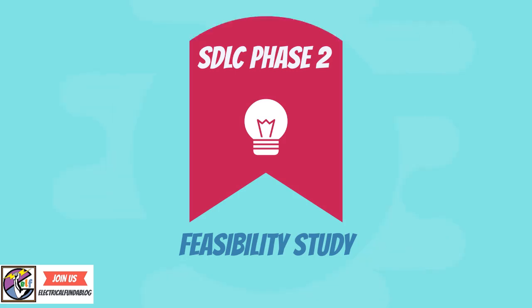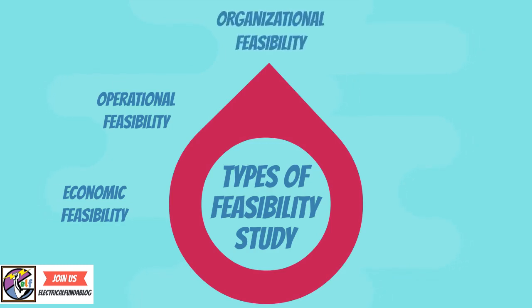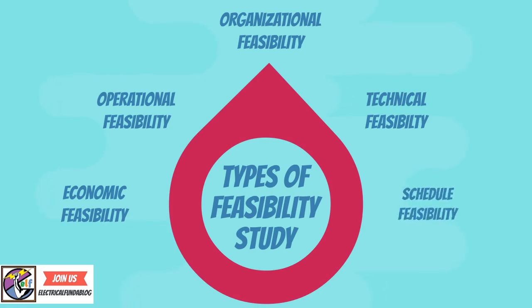Feasibility study types include: Economic feasibility — whether the project can be completed within the budget. Operational feasibility — whether the problem can be solved with the existing and proposed system in the user's environment. Organizational feasibility — whether the project can be handled consistently with company policies and objectives. Technical feasibility — whether the problem can be solved with the present computer system and available resources. Schedule feasibility — whether the project can be completed within the given time frame.